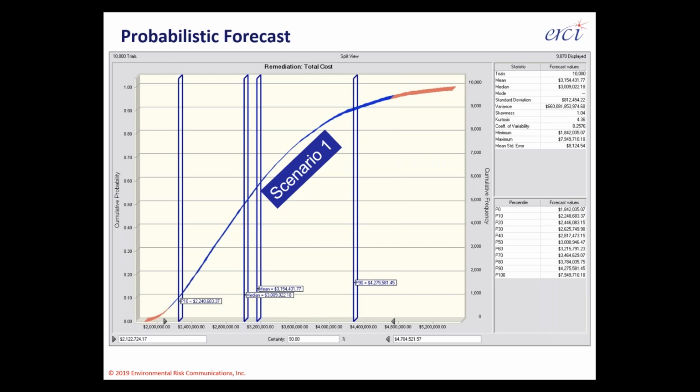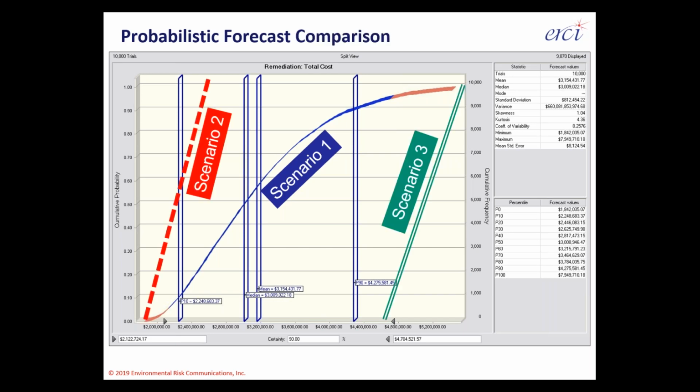What that does mean in turn is that you've got an arithmetic mean or an expected value of, in this example, 3.154 million that pops out of your modeling process. And that number may inform what you reserve, and it may inform what you put on the watch list. And the 4.275 number you see as P90 may be, again, a number that you express as a risk of an extreme negative outcome for an individual liability or project to settle a liability.